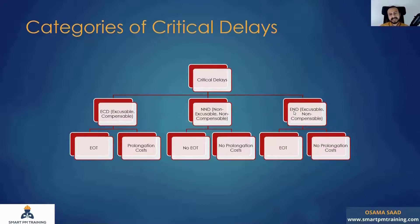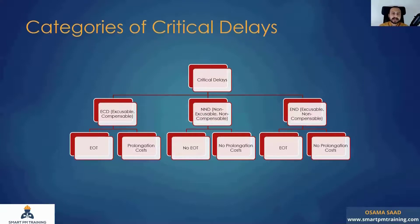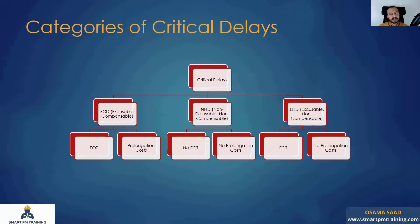The last category is ENT — Excusable but Non-Compensable. There is an EOT entitlement but no prolongation cost. For example, if the contractor submitted an extension of time of three months plus 10 days caused by force majeure — such as an act of God or adverse weather like snowfall — these 10 days are not caused by the employer. They are beyond the employer's control. So the contractor has entitlement to those 10 additional days, but there is no cost entitlement — the employer should not reimburse the contractor for these additional 10 days.